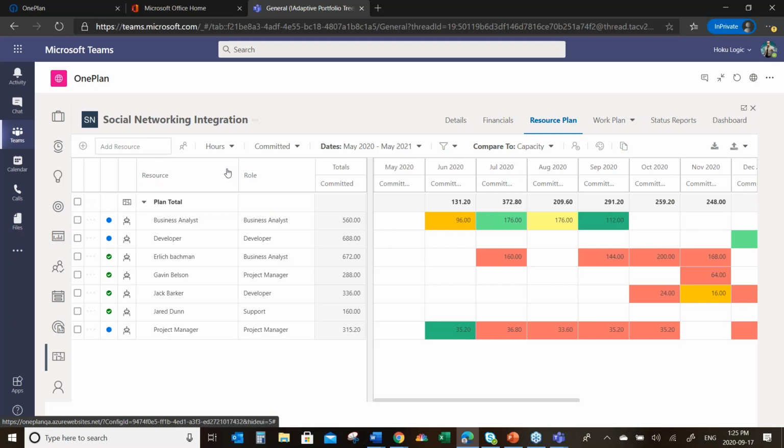And so what I'm looking at here is, where do I think I will need this role on this project? What is the expected demand? I'm not interested right now in the specific tasks. We're going to come back to that a little bit later and show how we go to that next layer. But this is, if you go back to some of the stuff Jim was just talking about, capturing that initial demand and understanding what your capacity is. I am comparing this to the capacity within the overall organization. And that's what's driving the color coding you're seeing on each of these things.